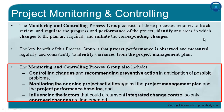Together, these baselines form the project performance baseline, which is used for tracking the performance of the project — whether it is going to deliver the complete scope on time and within the budget. In the monitoring and controlling process group, you monitor ongoing project activities against the project management plan and the project performance baseline. You also influence the factors that could circumvent integrated change control, ensuring only approved changes are implemented. This integrated change control process is one of the important processes in monitoring and controlling.